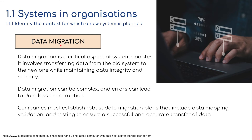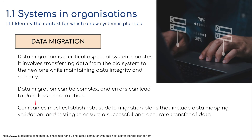Data migration is a critical aspect of system updates. It involves transferring data from the old system to the new one while maintaining data integrity and security — we don't want information lost or reaching hackers. Data migration can be complex, and errors can lead to data loss or corruption. Companies must establish robust data migration plans that include data mapping, validation — checking that data sent from one machine matches what's received by the new machine — and testing to ensure a successful, accurate transfer.